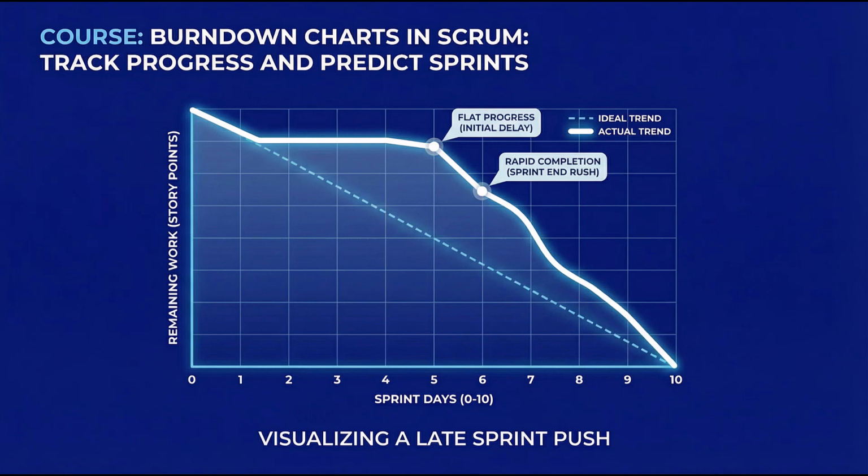Diagnostic questions. Are we spending too much time in analysis before starting implementation? Do we need better refinement before sprint planning? Are tasks too large to show incremental progress? Action framework. Daily stand-up. Encourage spikes or research tasks to be time-boxed and completed in the first 2 days.